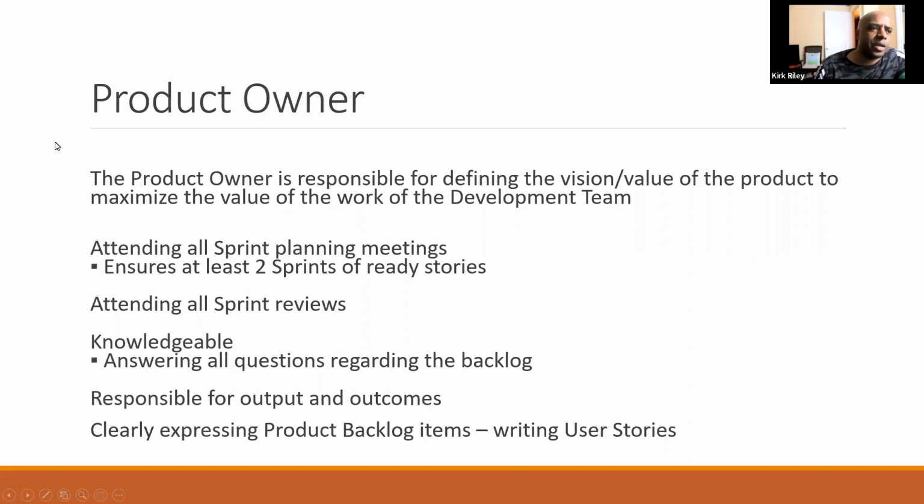Yeah, and another thing I want to throw in. Victoria, normally what we do is, for the business value, for the most part, it's monetary. We want to know how much money it is going to save the company. Sometimes it's not always about money. It could be how much time it is going to save the average engineer to resolve a customer issue. Not everything that we work on has a monetary value, so that's another condition we use to give a business value.